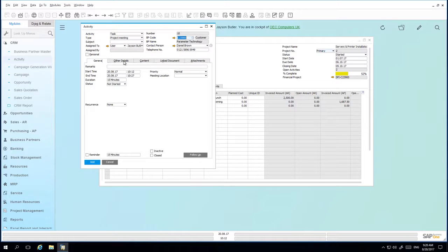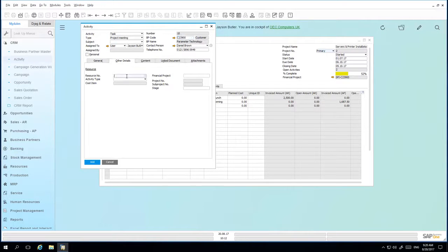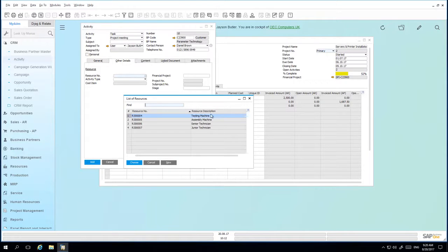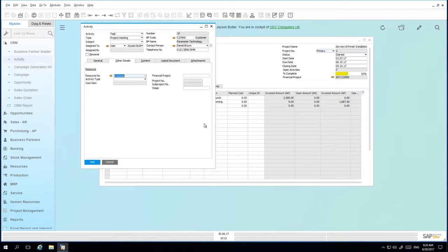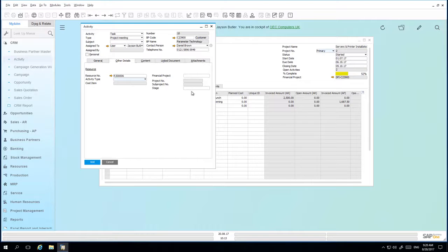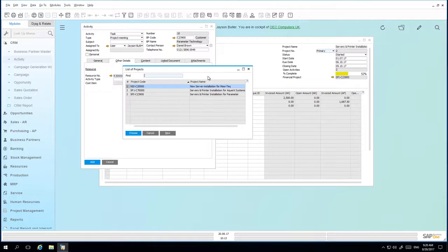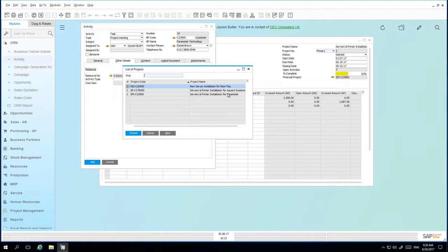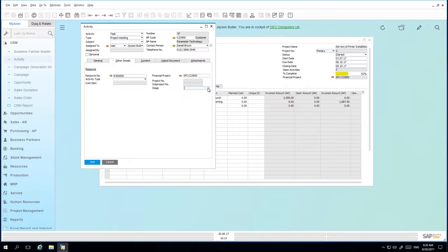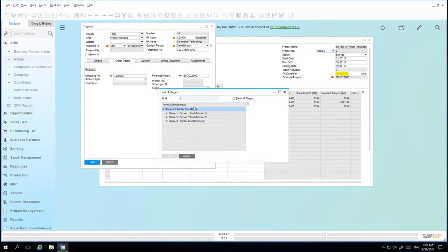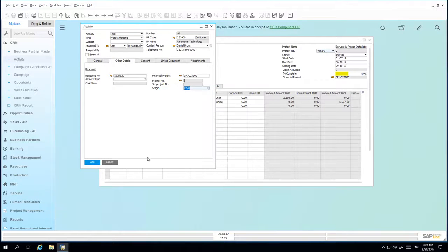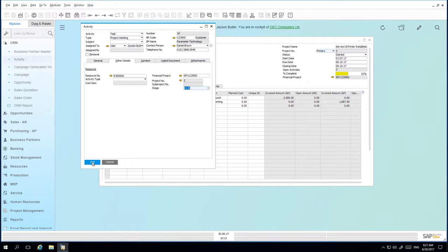Under the other details tab, we now have the option to assign a resource master data to the activity. So for example, if the activity required the use of a technician, you can then select the appropriate resource, such as a senior technician. And you can also select the relevant activity type. You can assign a financial project, which will then populate the project details below. Or you can assign directly to a particular project stage. Let's assign the financial project. And we're also going to assign the stage within that project in which this activity took place. And now we can add this activity to the system.